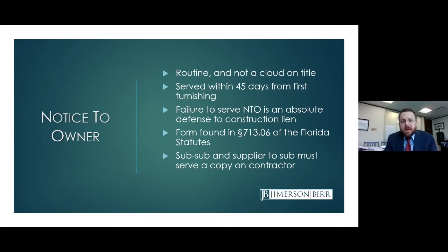What do you need to know about it? You have to serve it within 45 days. The form is found in Florida statutes, and just follow that form. Use the notice of commencement in filling out the notice to owner form. And know that if you don't do it, or if you do it late, if you do it after 45 days from first furnishing, you have no lien rights. It's a very strictly construed rule, and so you must follow it.